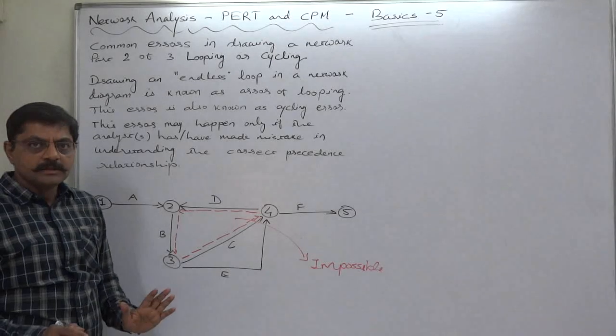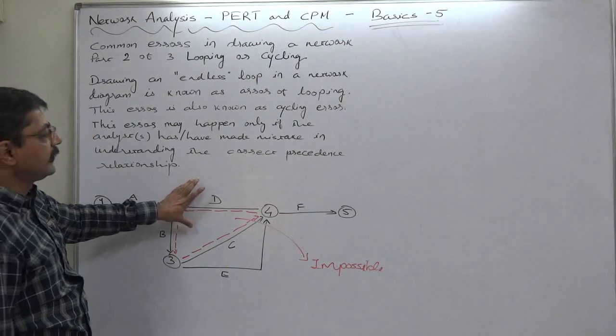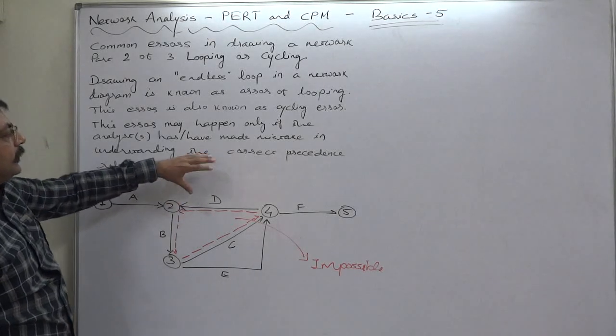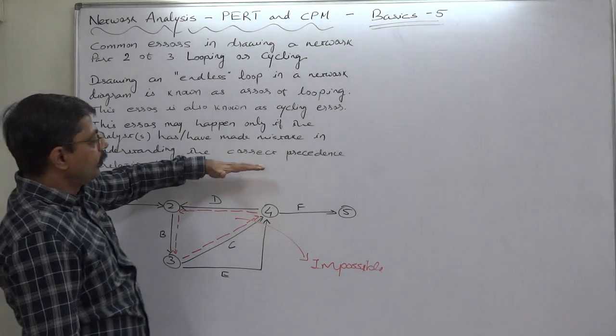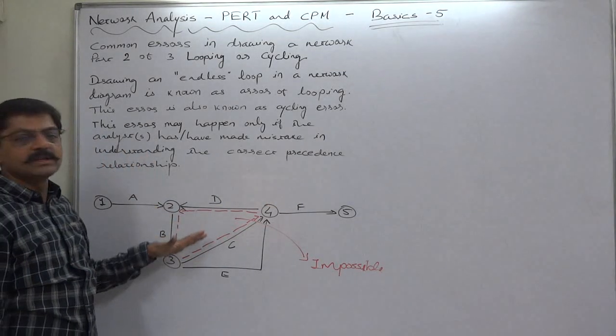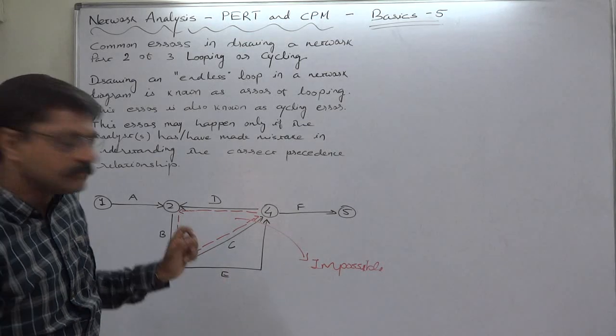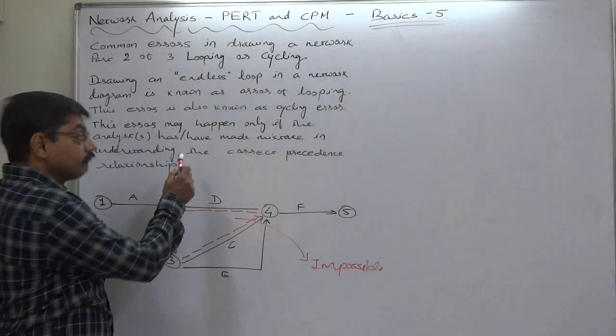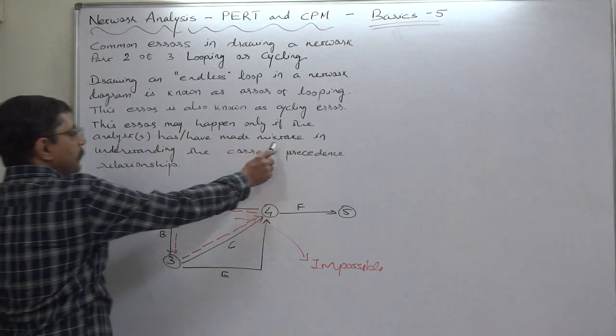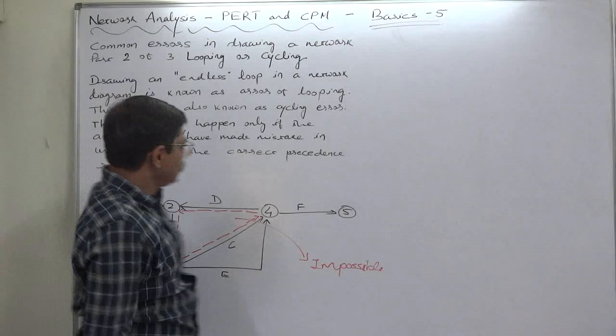But generally this kind of error can take place from the data on the basis of which the person is trying to draw the network diagram, and the main cause might be the mistake in understanding the correct precedence relationship.